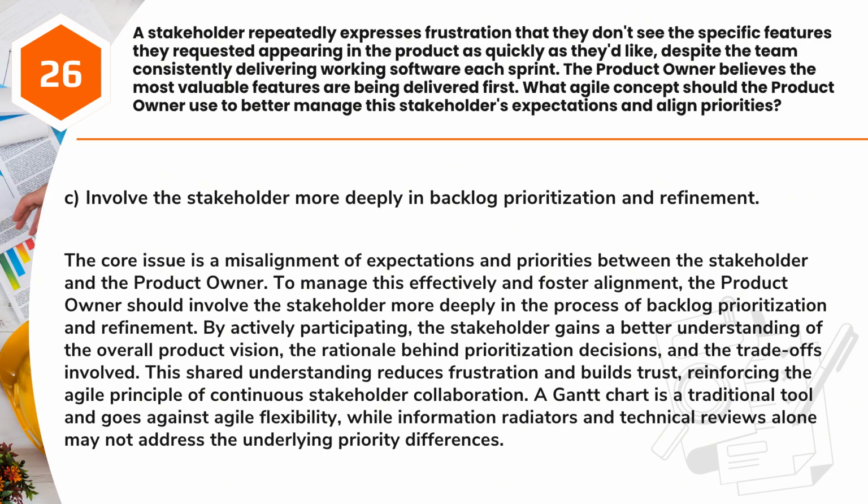The core issue is a misalignment of expectations and priorities between the stakeholder and the product owner. To manage this effectively and foster alignment, the product owner should involve the stakeholder more deeply in the process of backlog prioritization and refinement. By actively participating, the stakeholder gains a better understanding of the overall product vision, the rationale behind prioritization decisions, and the trade-offs involved.